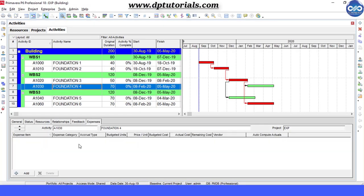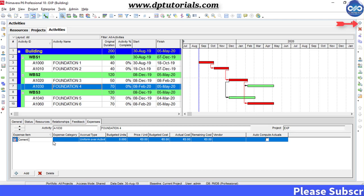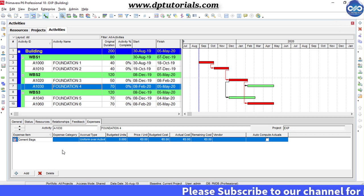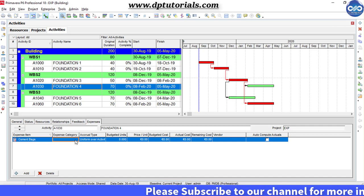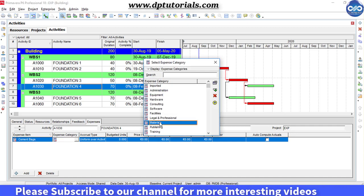Go to the expenses tab, click on the plus add button at the bottom left corner, and enter the expense item name, say 'cement bags', and select the expense category as materials.